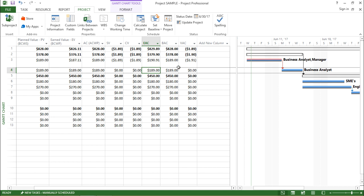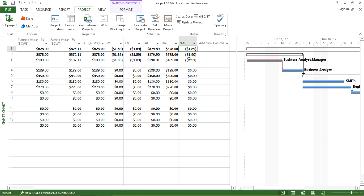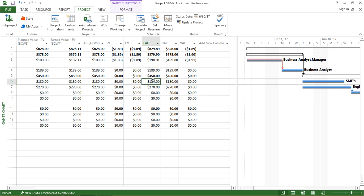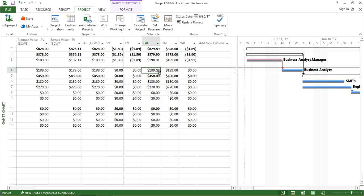Moving on with VAC, that is Variance at Completion. Basically it is the difference between the Baseline Cost and the Estimate at Completion. So my VAC value is the difference between the EAC and BAC values — if I subtract these two I get the Variance at Completion. One important point about EAC: its value will sometimes go up and sometimes go down. Whenever this value goes down it is good news for your project, because the cost involved is reducing. I will always aim to reduce this value so that my project runs smoothly. Whether it goes up or down totally depends on resource allocation.